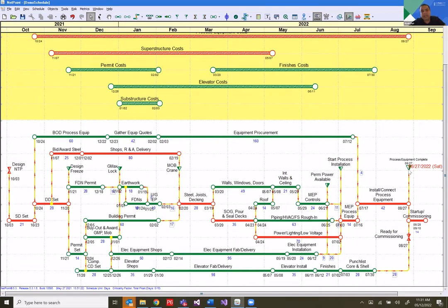In this particular case, I've opened a schedule which is more laid out manually, but it does not have to be laid out in any manner. You could have activities all on a single grid and Autograph can still lay it out for you. The idea basically is to minimize clashes: not have links that are lying underneath activities, not have too many crossing links, not have objects that are related being too far away.